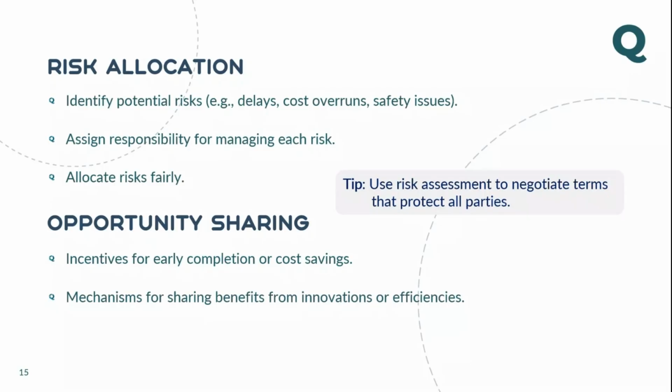And if the contract duration is significantly high, and if you think you can do the work before that, it's an opportunity. You crack your program, revise the program, and finish the work before 2 or 3 months, so that you will get early release of retention money. You can move from the contract. That's an opportunity for you.